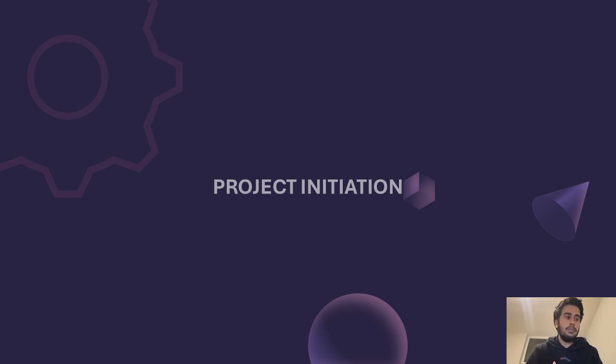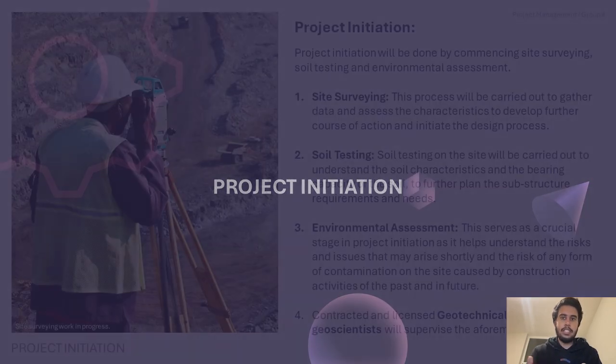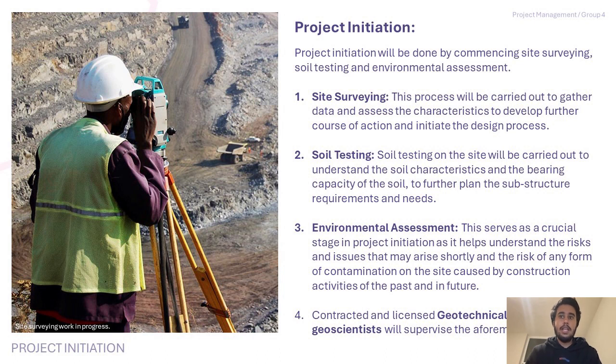So once the project has been appointed to the company, and once the team has been formulated and the initial conceptual ideas have been formulated, the physical start of the process, or the project initiation, will be done by conducting site surveys, soil testings, environmental assessments and all of that on site.